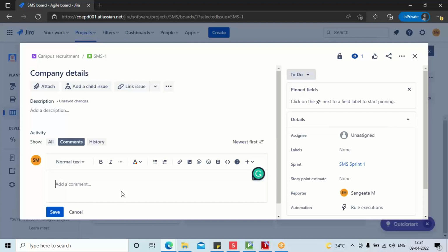Since even the project owner can add his or her comment, if he demands a change request at a very later stage where the developer team has already extracted the information written here by the BA and the product has already been developed, what will be the action taken? In Scrum, we cannot say the product is completed because development is completed. I can have 50 or 70 sprints in this project. If a change is requested, can't I create one more sprint? Because development is not over. For this feature it is over, but for other features it's still active.